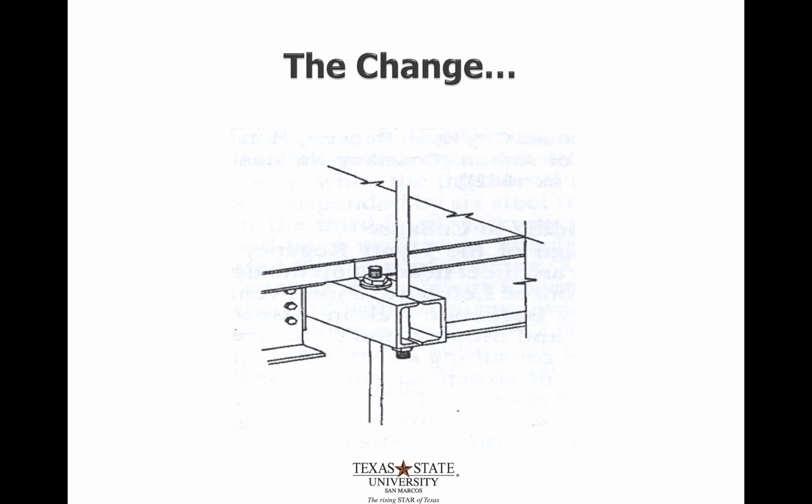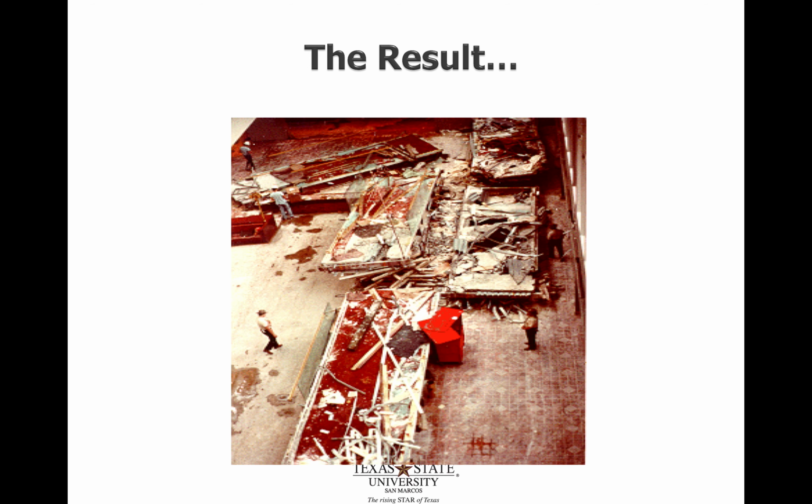Sent this change to the engineer, and the engineer did not review it for its structural capacity, and just stamped it and sent it along and told the constructor it is okay and acceptable to do that. Well, this change, since it was not analyzed, resulted in the failure of that walkway. I think there was a big grand opening, and there was a lot of people dancing on there, and so it had a lot of live load, and ultimately failed.